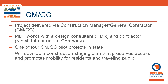In this method, MDT hires a contractor at the beginning of the design phase to provide detailed construction insight to the design team. The idea is that with more minds in the discussion and additional constructability information, we can develop a more robust and cost-effective project plan. Through a competitive process, MDT selected Kiewit Infrastructure Company as the contractor for this project.